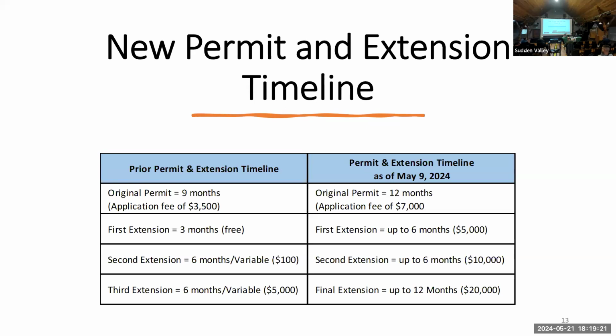The logic behind this is that since we had guidelines for the ACC, the expectation has been that new construction should be completed within 12 months. In fact, there is a fine on our books of $1,000, and that's 2016 at least. That fine is applied if you go over 9 months.